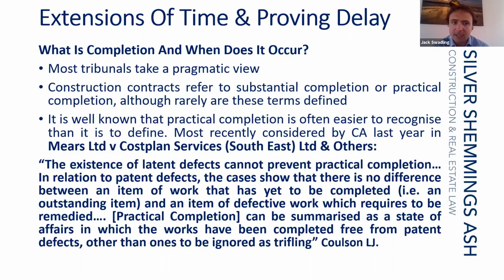As discussed in the recent case of Mears and Cost Plan, which I was involved in last year, the state of practical completion is often easier to recognise than it is to define. But in broad terms, Coulson summarises it as a state of affairs in which the works have been completed free from patent defects, other than ones that can be ignored as trifling.